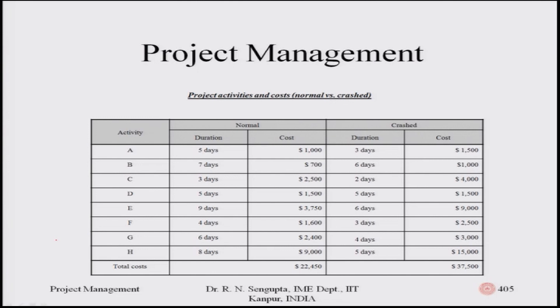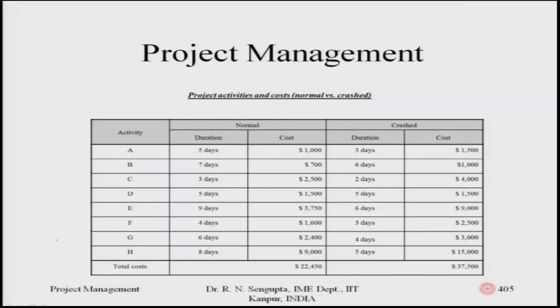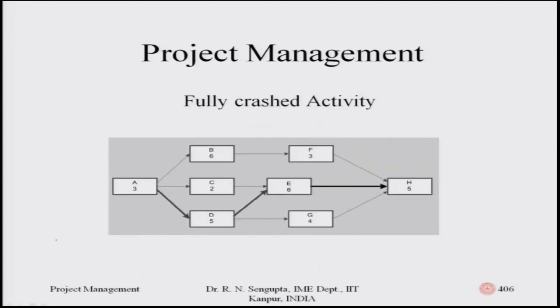When crashed, A can be reduced from five to three days — a maximum crash of two days. B can be crashed by one day with increased cost (from seven thousand to one thousand additional). C crashes by one day with cost rising from two thousand five hundred to four thousand. D has zero crash days so no cost increase. The fully crashed activities and their costs are given accordingly. The only key difference from the earlier problem is that this uses activity-on-node rather than activity-on-arc representation.